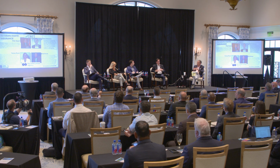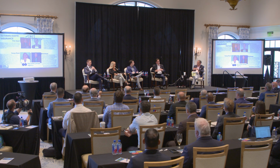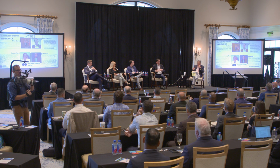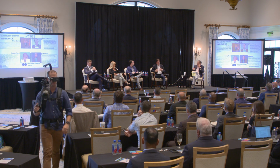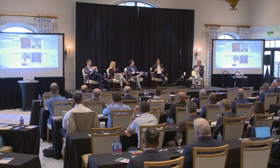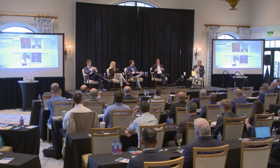So there's going to be limitations no matter what. I think one of the most important things is, if the builder's risk is difficult to get, maybe talking to the contractor to see what kind of installation floaters they may be able to obtain through their insurance agent. The installation floater would really just protect the contractor's interest as far as their machinery and the actual materials on site. A lot of times the contractors have a little bit easier time getting those policies in place versus having to put a full builder's risk on the entire golf course project.